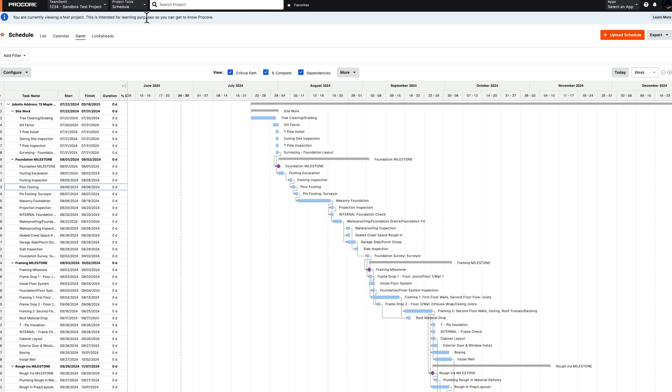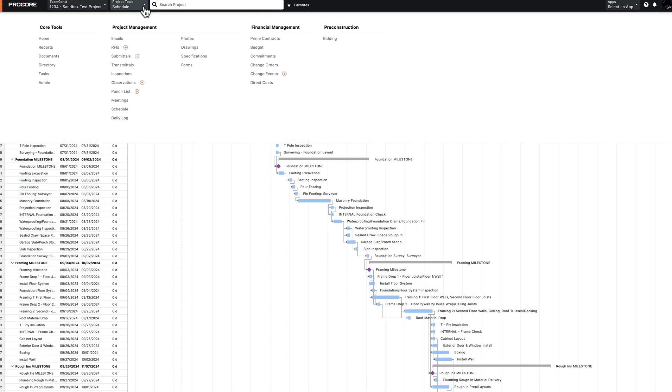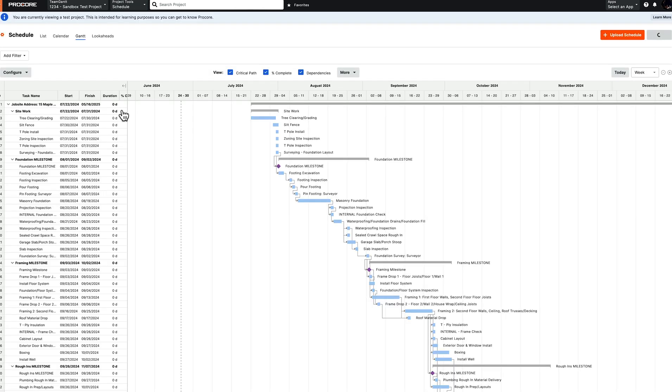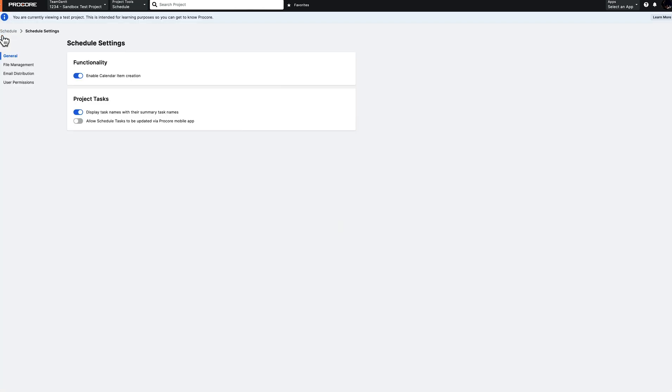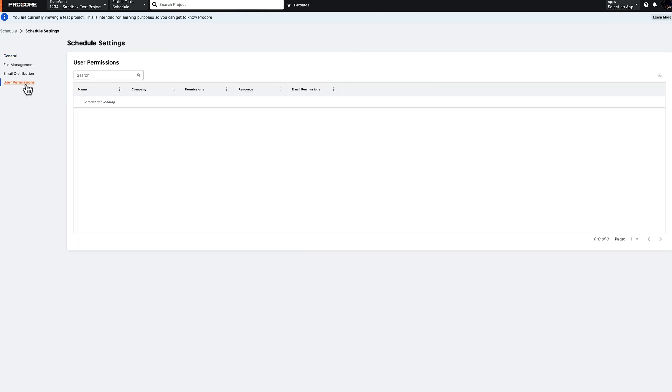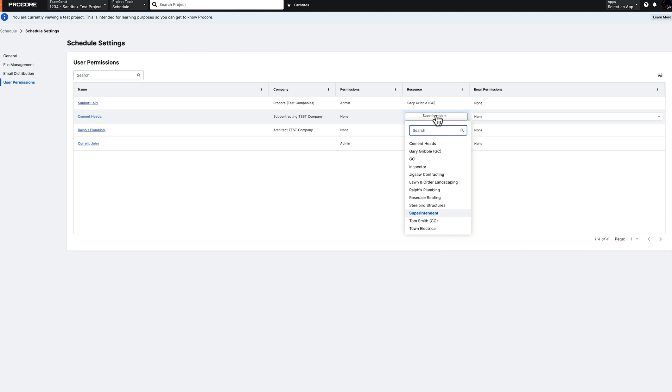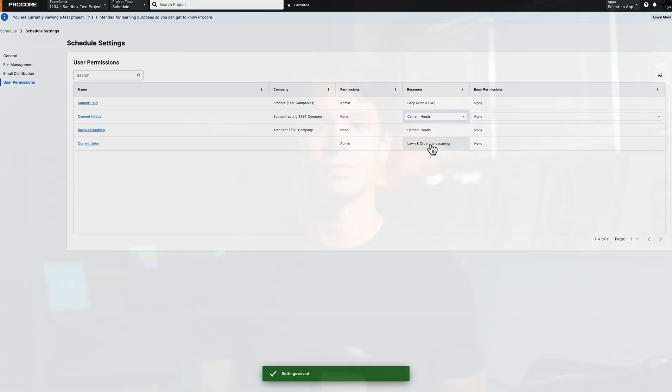To assign a resource to a user, click the Project Tools drop-down menu, select Schedule, click the orange gear icon, and select User Permissions. From here, you can assign the different TeamGantt labels as resources to each of the users in your project.